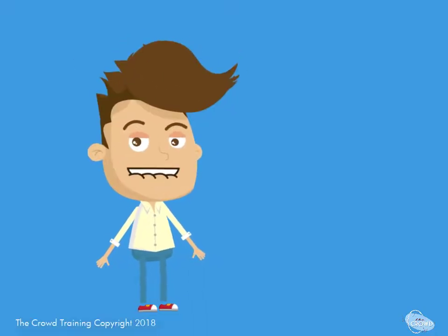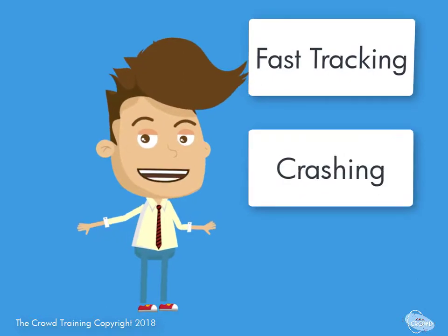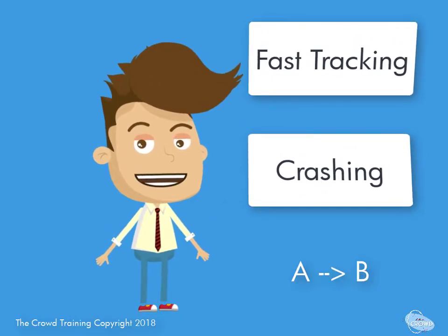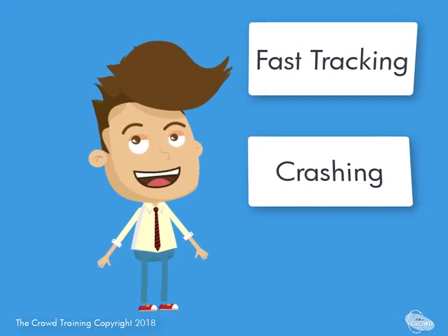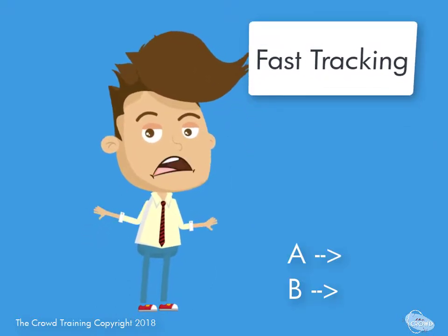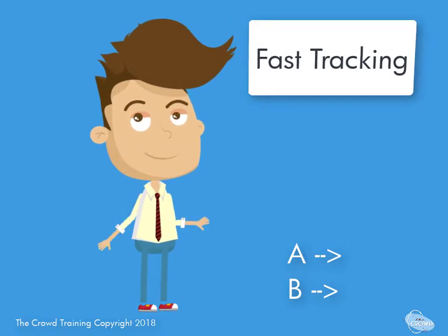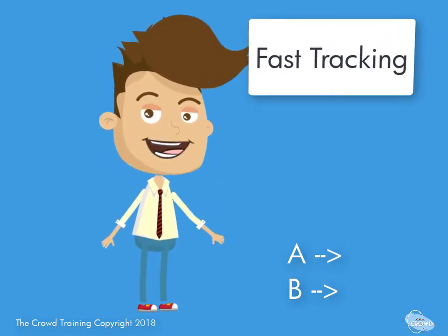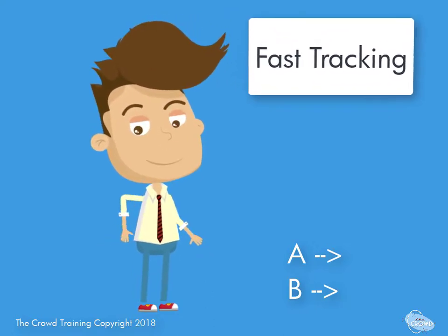When we refer to fast tracking and crashing, those are two techniques. We were supposed to do activity A and then activity B, but in this case we've decided that maybe they both happen at the same time, or we're going to start B just slightly before we were supposed to start A. So we would have two things happen almost concurrently or simultaneously.